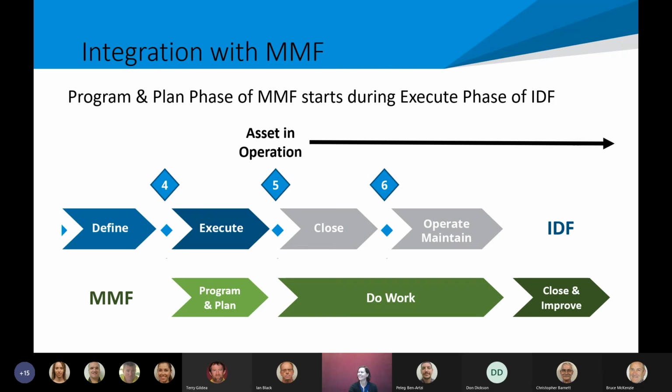We will. So, sorry, just on that MMF, understanding where the program plan is, that's fine. But I thought it would have started a bit earlier for resource identification, because if it's an 8-month project, it takes longer than 8 months to get extra resources in council. Yep, through the current system. So I think further back up towards the gate, I thought the MMF would have started, and then why don't we go for a short duration to understand what resourcing is required as part of the project. Then it might miss a few steps and then come to program and plan.